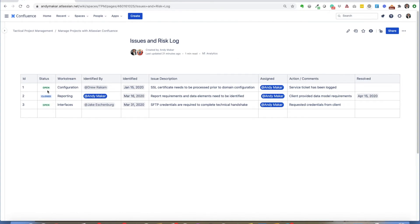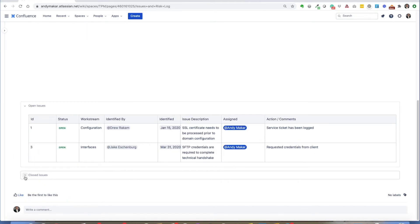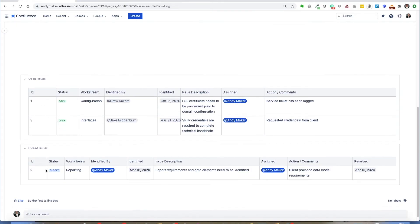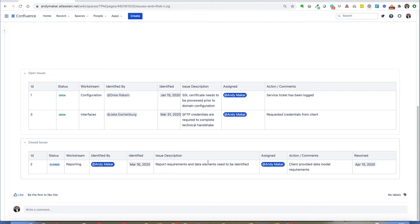We can use the status macro to identify open or closed status. You can assign end dates, tag and assign resources, as well as track how those issues and risks are progressing. Now if you were to close an issue, you can leave it within the table format. Or there's another option — using the expand macro, we can view the open and closed issues. If I have a closed issue, I just move it out of this table and paste it below, so it's a nice way to look at just the open issues you need to be concerned about. But if you want to go back in, you can use these macros to get into the closed issues — just another effective way to manage an issues list within the tool.